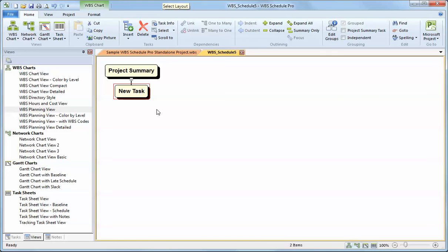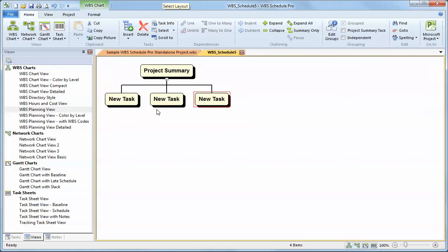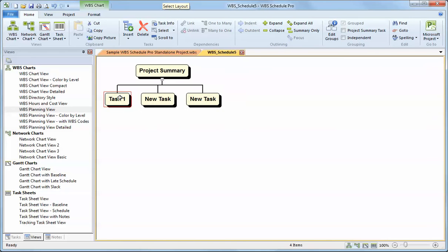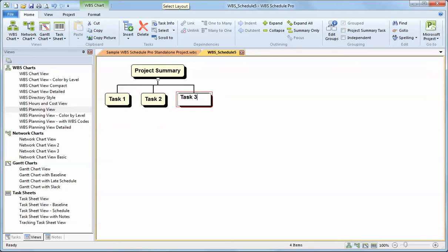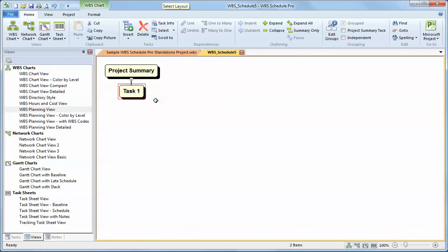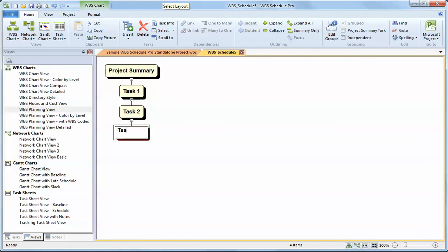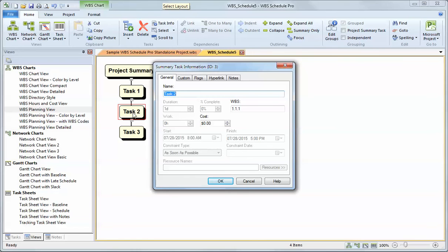One thing I want to mention here is the proper way to structure a project. What I did when I created this plan was I created these tasks in a left-right fashion. These are three tasks now that are subordinates to the summary task up here. Sometimes we see people create projects this way, and that's not right because task three is a subordinate of task two. Task two will become a summary task.